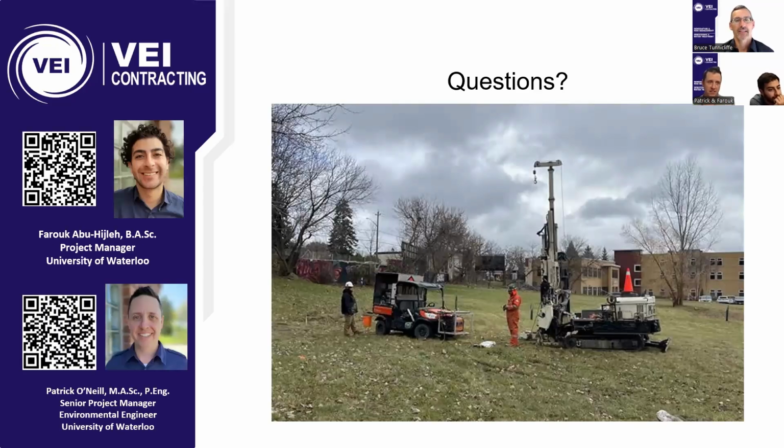In relation to a project timeline for a development site, when is the best time to complete HPT? I'd say from a calendar's perspective, not in the wintertime, but from a project timeline, whenever you're doing your hydro-G assessment. The HPT is not going to be there to replace that hydro-G assessment. It's there to supplement it. So whenever you're doing that process, for sure, get us involved at that point.